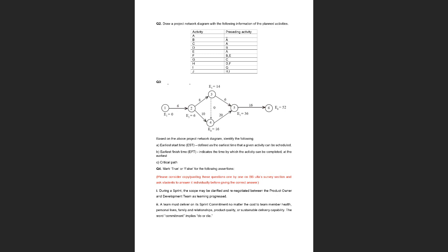But interestingly, there was this word commitment mentioned in the Scrum guide. And some project managers took it too literally, and it became a do-or-die kind of situation. So the people who developed the Scrum guide actually had to revise it and take the word commitment out in November 2011, because some project managers were taking it too literally and pushing the team members too hard to deliver the outcomes on time. So whatever timeline you make for your sprints, you have to know that this is just an approximate forecast and it is not the actual one.